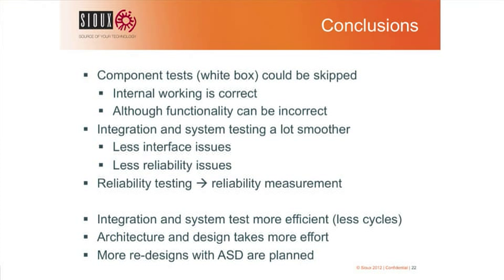What we saw, on the other hand, is that the architecture and design work of the software engineer takes more effort. That's of course understandable, because the software developer has to think about this bad weather behavior and all the illegal things that can happen. Normally, in other projects, he still needs to think about them, but that was part of the integration phase.